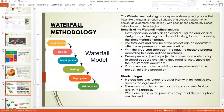Welcome to the Waterfall approach. The Waterfall methodology is a sequential development process that flows like a waterfall through all phases of the project — from requirements to design, from design to development, from development to testing, and later they added deployment and maintenance. That is how it keeps flowing: requirements, design, development, testing, deployment, and maintenance.